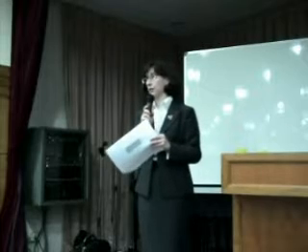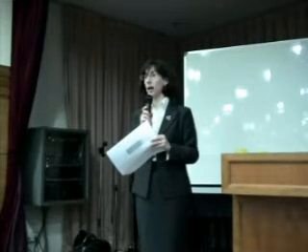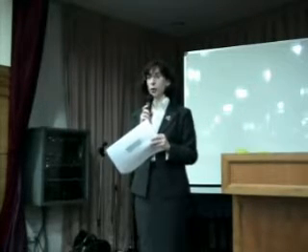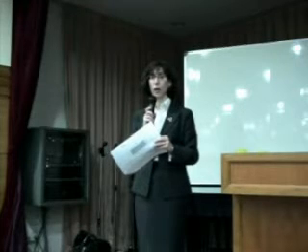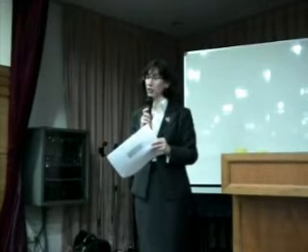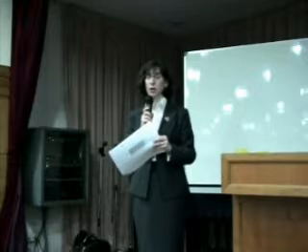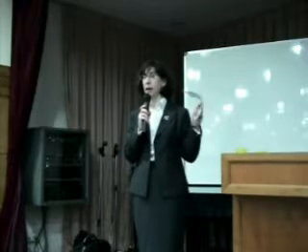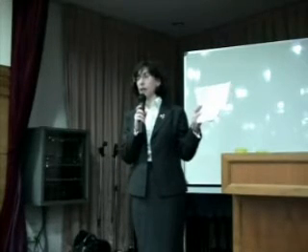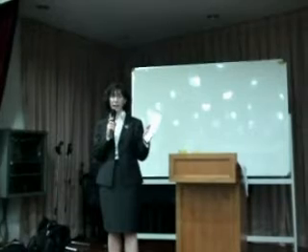And that happens on our projects all the time, where when you actually dig into something, you realize that it's really not what you liked, or it was harder. Typically, it's harder than you expect, or it's going to take more time. And the thing about Agile is that you would simply add that as a new backlog item and allocate that to someone at the appropriate time.